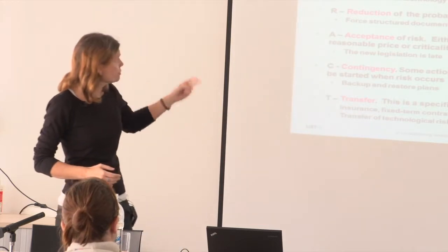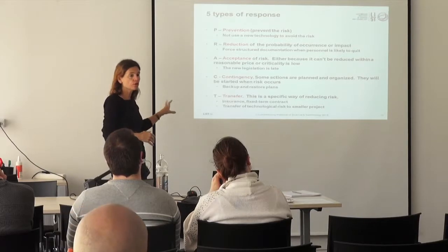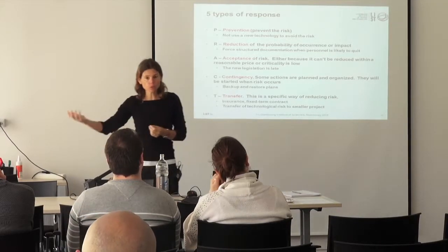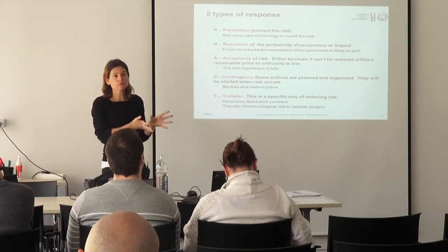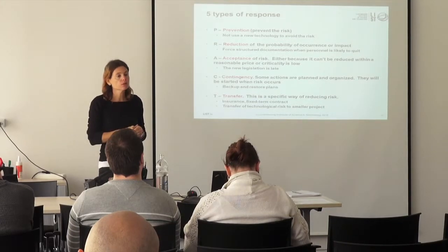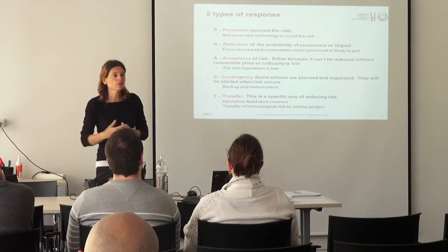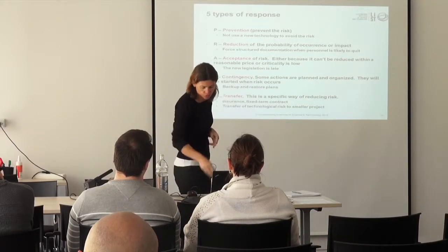In the case of that new technology we wanted to test, you can transfer by having a proof of concept or having another small project, test that technology, and maybe delay that second big project, wait for that proof of concept to use that technology once you are more trained and used to it. So that's one kind of transfer also.